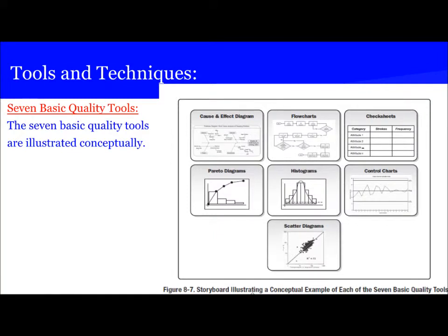The next thing is the scatter diagram, and we have already discussed this in the past, but let's discuss it again here. This is the dependent versus independent variable relationship. The closer the points are to the diagonal line, the more closely they are related and statistically dependent.